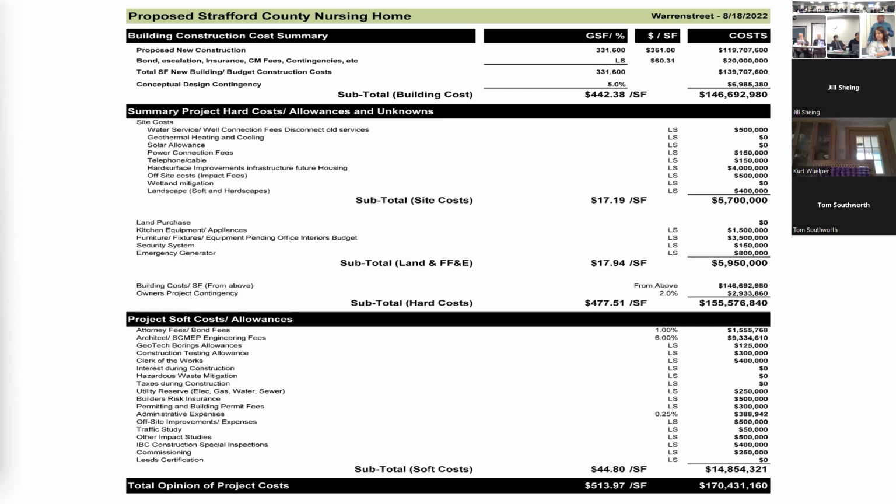Today, no, you're not going to get a guarantee, but the best thing that we can do is buy this as soon as we're ready to go. So what we're doing today, most of the contractors, including Harvey, during COVID, Harvey built a 40,000 square foot warehouse. So they buy the entire job out.